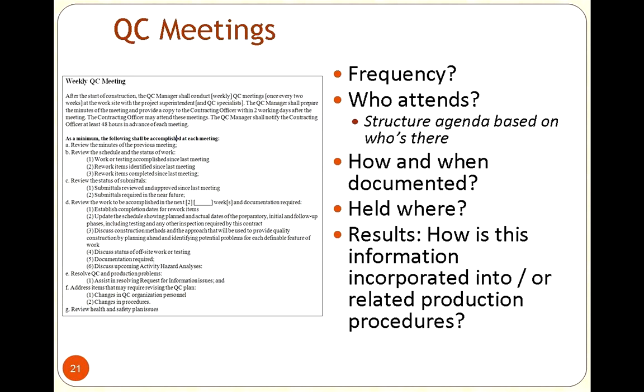But also what we would do is document a lot of the meetings. For these meetings, we're going to be keeping minutes. So we're going to set up an agenda. We're going to have that agenda out before the meeting, some way, shape, or form, about what we're going to do and who's going to be there, and then we'd also have the minutes from the previous meetings.